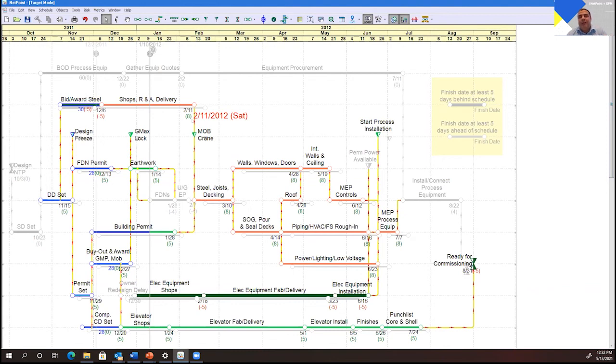The target information does not go into P6 as a separate schedule. You would have to have the two states as separate NetPoint schedules exported into P6 and then in P6 assign a baseline. So basically one snapshot of the schedule saved as baseline and another one as the first update. Then you would export both of those to P6, but it doesn't automatically go with all this fancy formatting. And then in P6, you would have to mark the baseline schedule as baseline for the first update.